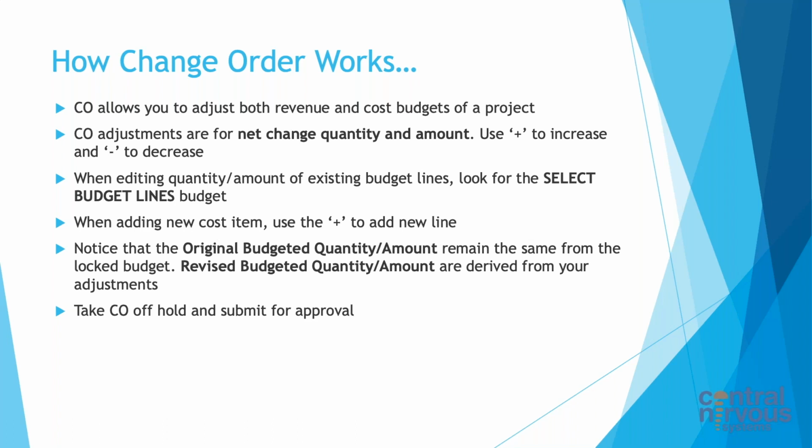When editing quantity and amount of existing budget lines, look for the select budget lines option. We'll see that when we do a demo. When adding a new cost item, we want to use the plus to add a new line so that it doesn't get put in with the rest of the tasks that we have in place.